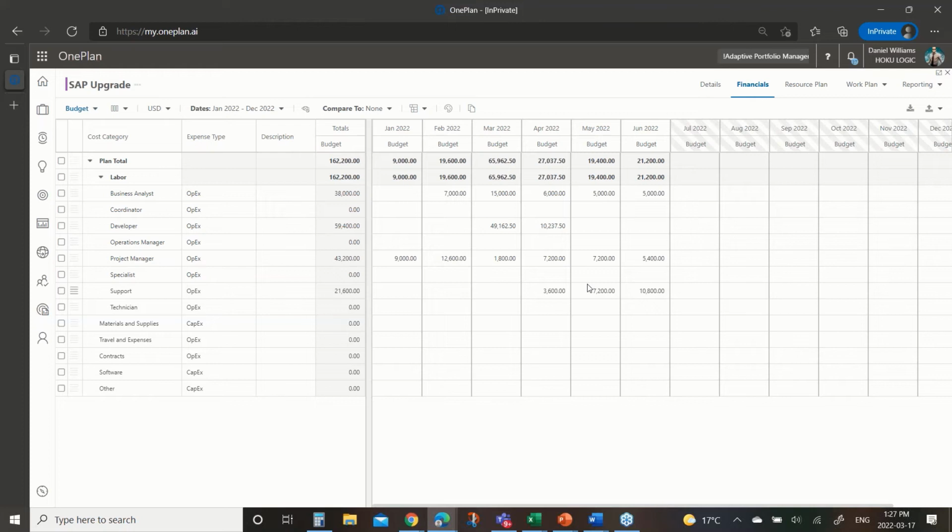So I look at my resourcing commitments. Maybe I collaborate with some colleagues and say, hey, to the development manager, what do you think you need in terms of the scope of this project, and what level of development effort, and what's the PM effort going to be? Do we need a business analyst full-time, part-time? Is it front-end loaded and so forth? And we sketch all that out, and then we can draw that data in using rates and roles for the roles in the system to help build up our budget for this particular proposed project.